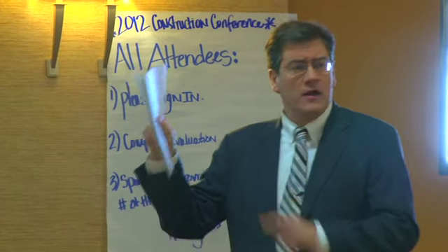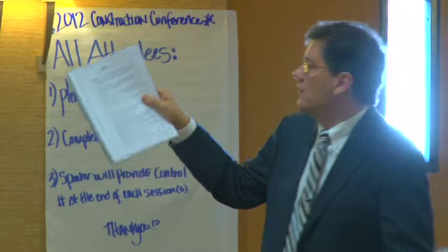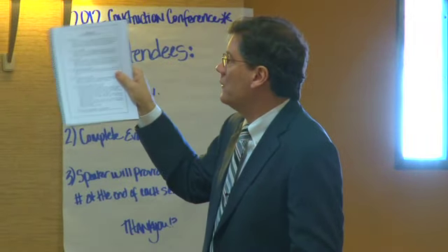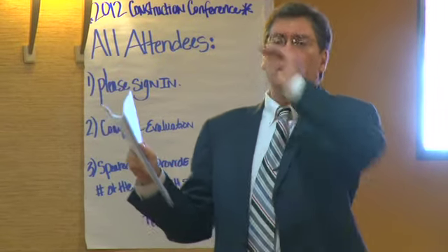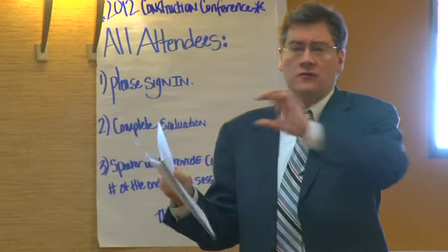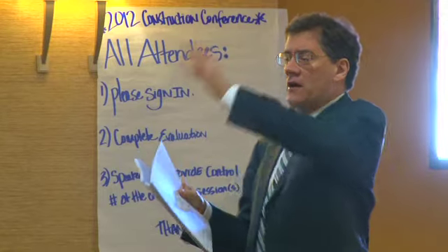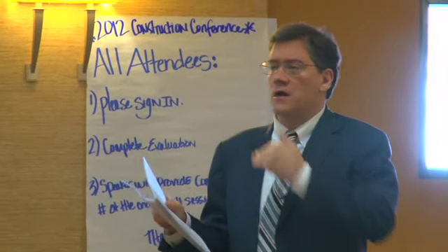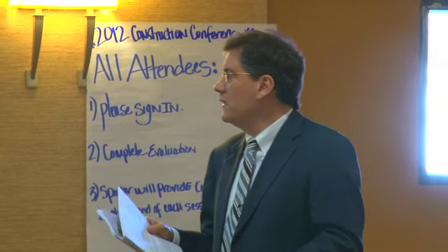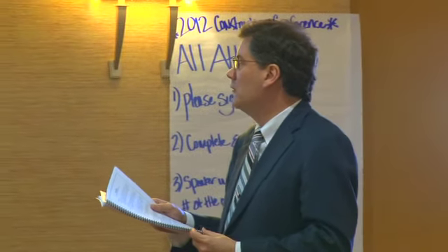The general contractor cannot serve a stop notice against the owner, but a general contractor can issue a stop notice against the construction lender. You're skipping up one step. You're skipping the intermediary party. So the GC's got to skip the owner. You are skipping the GC as a supplier or subcontractor and serving it against the construction lender.